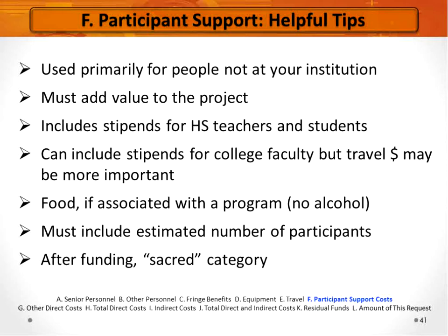This is, again, just to say that this is a category where, let's say that you were going to do summer workshops and you found out that due to where you are just geographically, instead of getting 25 people per summer, you were only able to bring in 15. So towards the end of your award, you're actually going to have extra money in there, and well, you could do an extra summer workshop, or you could create a notification or request to your program officer, have that formally submitted via Fastlane, and the program officer would look at your justification where you said, gee, I thought I could bring in this number of people, actually brought in less.